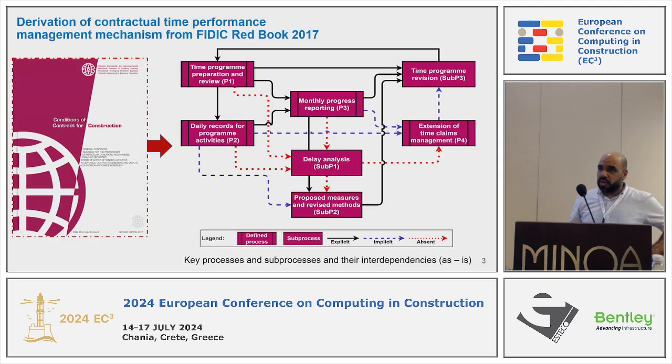Just to give you a feel of what we mean by time performance management here, it is not in fact a single process, it is a mechanism that consists of several processes and sub-processes. And in this particular instance, we have derived these processes and sub-processes from the standard form of contract, here the FIDIC Red Book 2017 edition, and this was based on contractual analysis that has been validated by 3 experts from the FIDIC field.